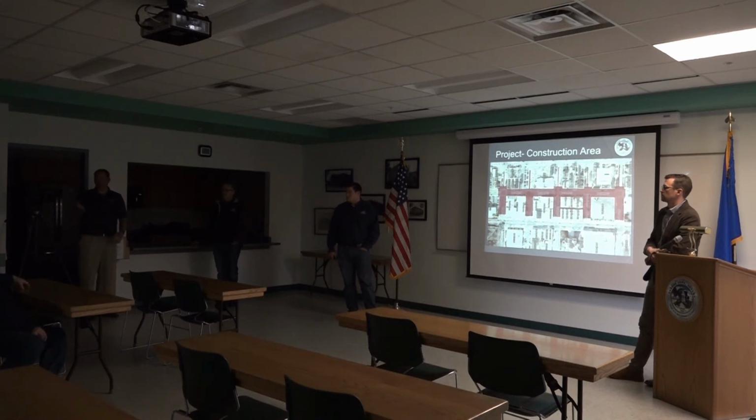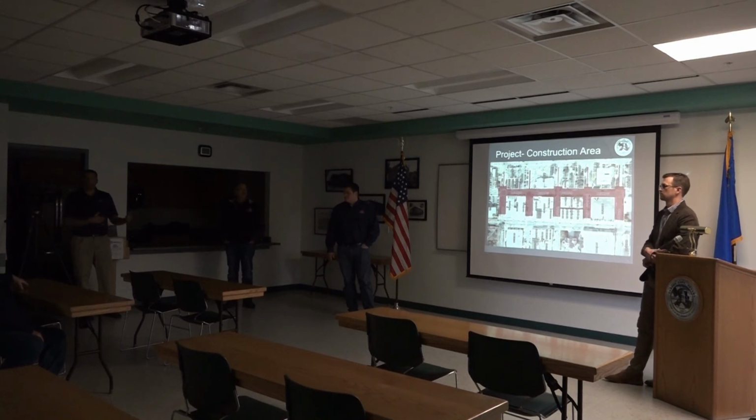Because there's the flip side, right? If we commit to you that on this date this is how it's going to look, and we start gaining schedule, now we have to stop and slow down. And that's not advantageous to anybody. So the better thing would be for you to communicate what events you want and how you want them to look, and we'll do what we can to accommodate that and make a commitment to you on that, in that kind of reverse fashion.